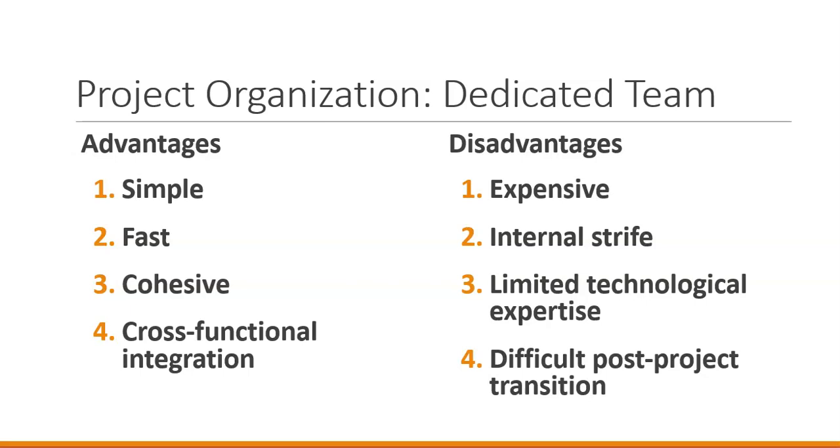The disadvantages are that it's expensive. We have to be able to dedicate the salary and resources to have a dedicated project team, which means that as an organization, we have to have enough projects to justify having a project team.